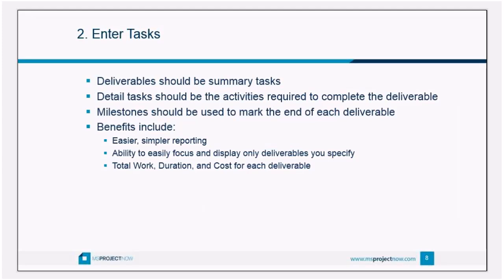At the end of each deliverable — at the bottom of each group of subtasks — you want to have a milestone to mark the end of that deliverable. Having a milestone for every deliverable in your project does a couple of things. Most importantly, it makes it easier to set dependencies between deliverables. You should never, ever put a dependency on a summary task — no exceptions. Use those milestones for cross-deliverable dependencies.